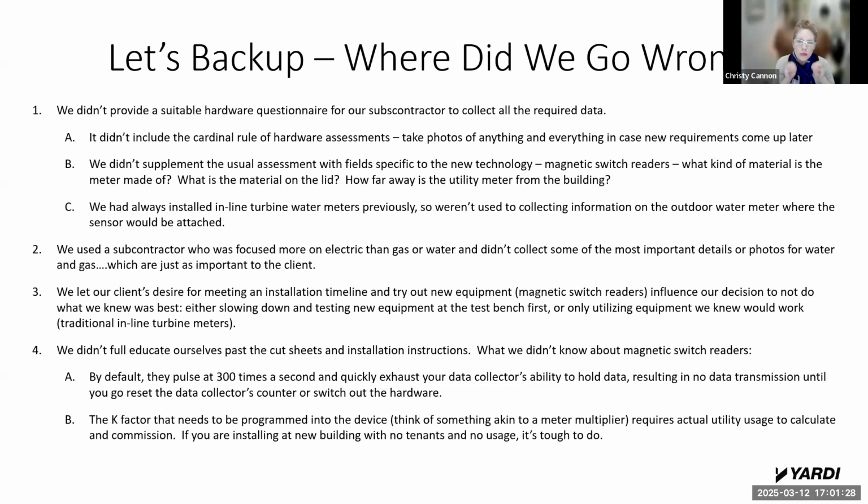They pulse 300 times a second. Who would have ever thought that would be a thing or need to be a thing? Because we certainly didn't. We didn't see it in the literature. So our data collector that we installed had a limit of 16 million pulses, and within 3 months, it maxed out.